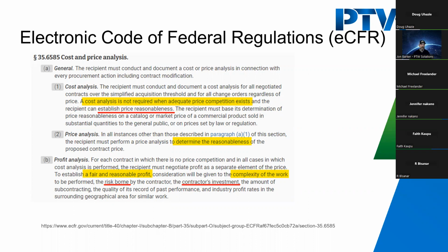The fringe, overhead, and G&A rates include the fee, which a lot of people call a wrap rate or a labor multiplier. I've seen companies that get like a 1.3, and I've seen companies that get like a 3.0 in terms of what that wrap rate is. So those are the major components of a cost analysis. The whole point is to demonstrate price realism, like what a fair and reasonable person would pay, right?